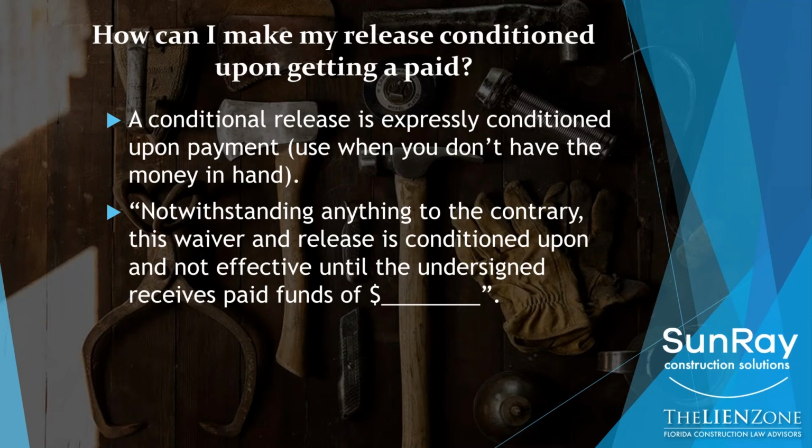Notwithstanding anything to the contrary, this waiver and release is conditioned upon and not effective until the undersigned receives paid funds of, and it has a blank. So if you're expecting a $25,000 check, you're going to write in $25,000 along with this sentence. You can go ahead and write that in by hand. You can type it in.